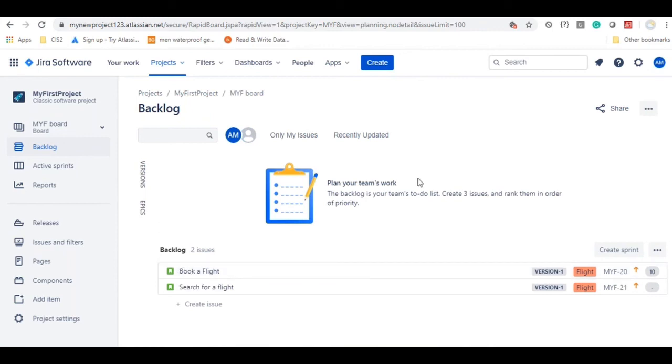And again, the same process repeats. You will be starting the new sprint: planning 1, planning 2, sprint progress, and at the end, review. Once the review is done, whichever are accepted by the end user will be closed. Whatever are not completed will be sent back to the product backlog. They will be taken once again in the upcoming sprints. So this is how the sprint works.